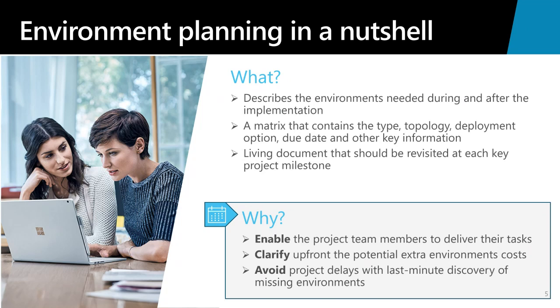The environment plan is also important because it helps clarify the upfront and potential environment costs. If you plan those environments well in detail upfront, then you'll know exactly what those costs are going to be throughout your project and when those additional funds are going to be needed. It's not uncommon that people don't plan for those environments that are needed just before go live for training and performance testing, or even up at the beginning for data migration appropriately.